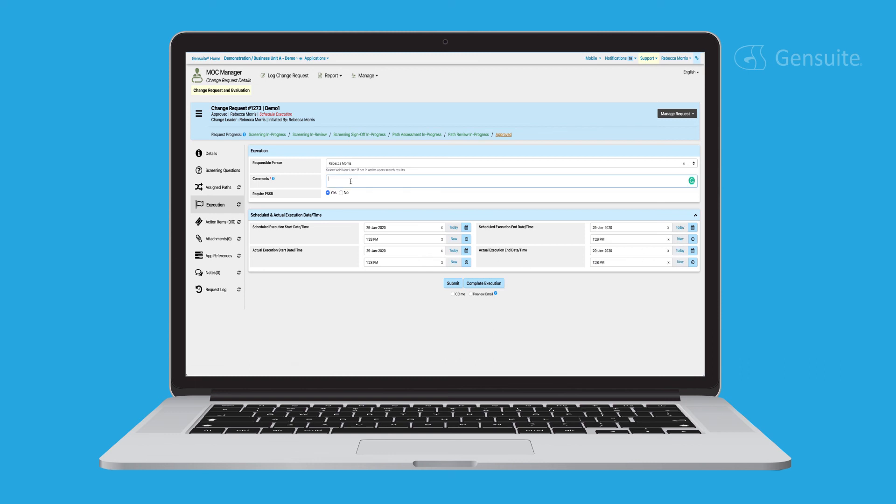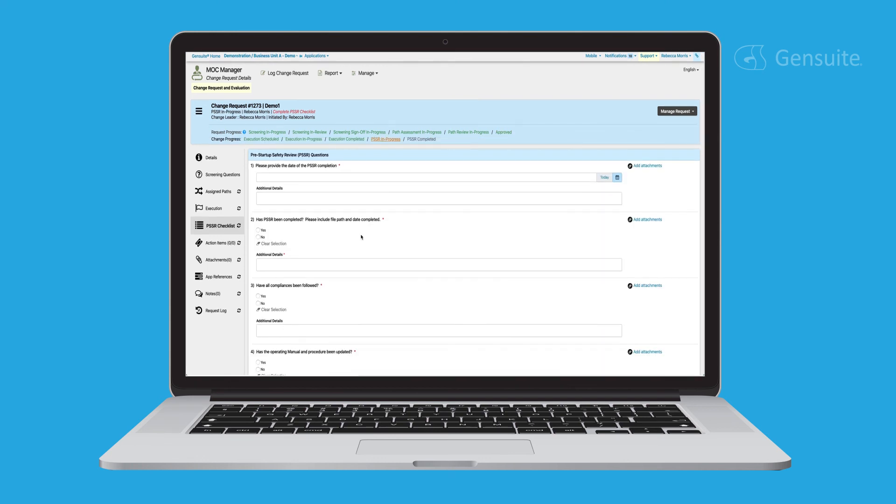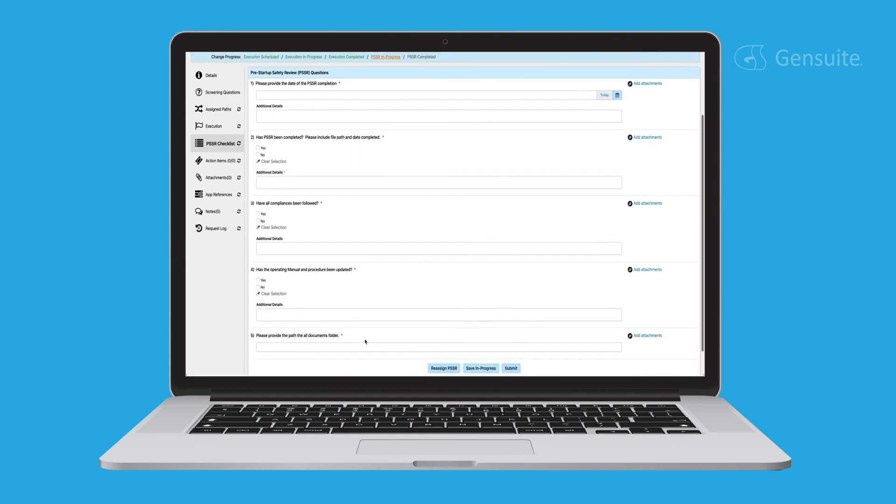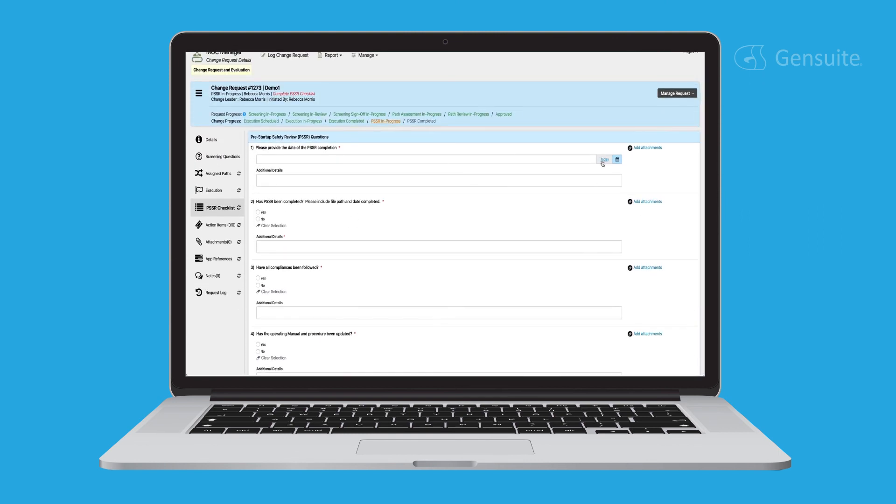Once the execution is complete and if the pre-startup safety review, PSSR, is opted for the request, it can be marked as complete by the change initiator or executioner. This will then ensure that the checklist is fully completed.